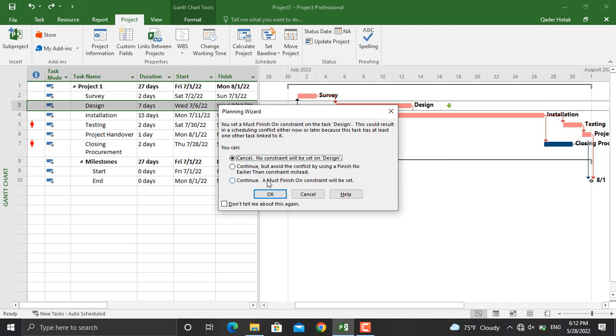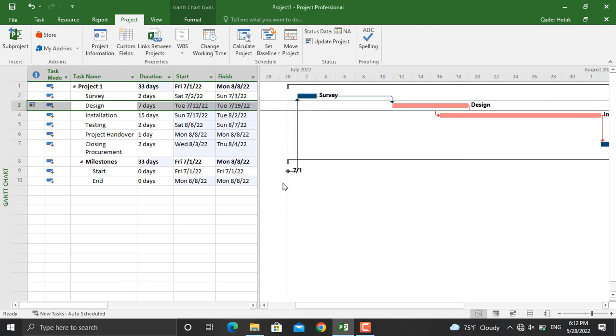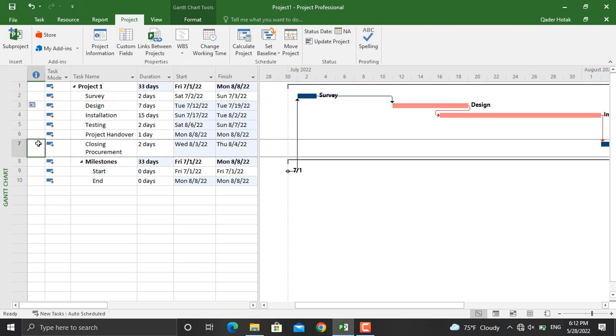The activity continues. Click OK, and as you can see, the activity will move forward because we told Microsoft Project that this specific activity must finish on 19th July. And besides that, a calendar icon will appear here, which shows that there is a constraint set for this specific activity.